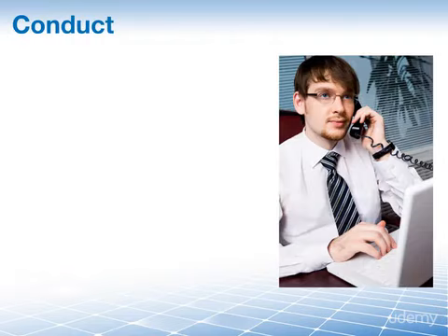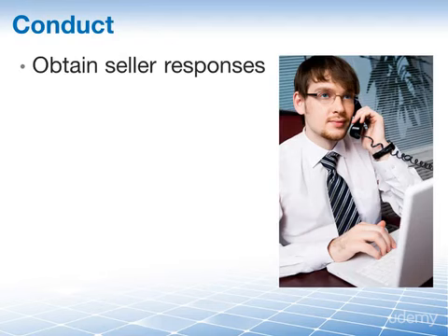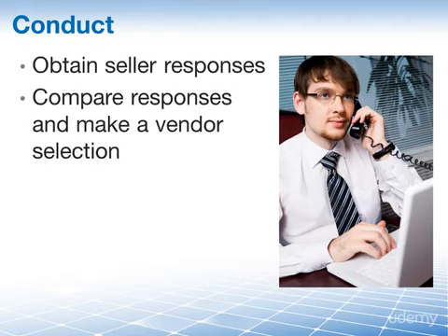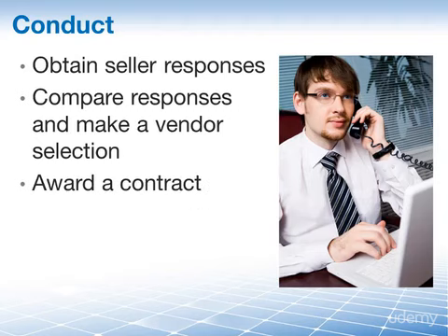After planning, we conduct or execute the procurement. We do the following. We contact and obtain responses from sellers, and based on established selection criteria, we compare the responses to make a vendor selection. There may be further interactions and negotiation involved, but eventually both seller and vendor agree, and the contract is awarded to the selected vendor.